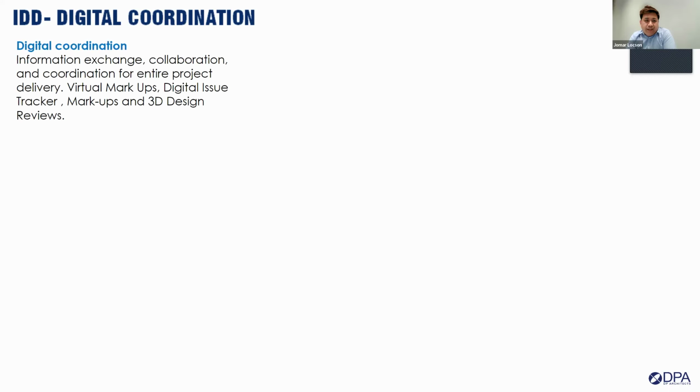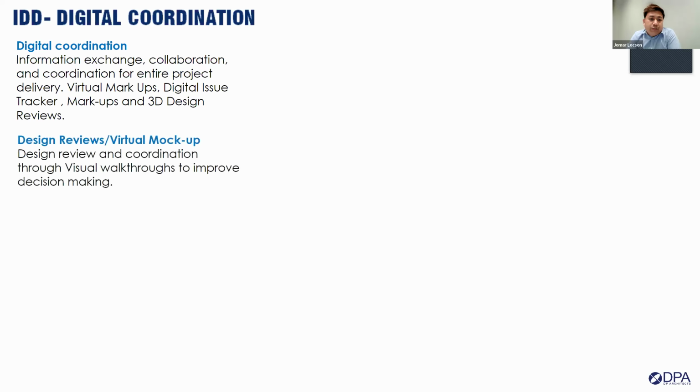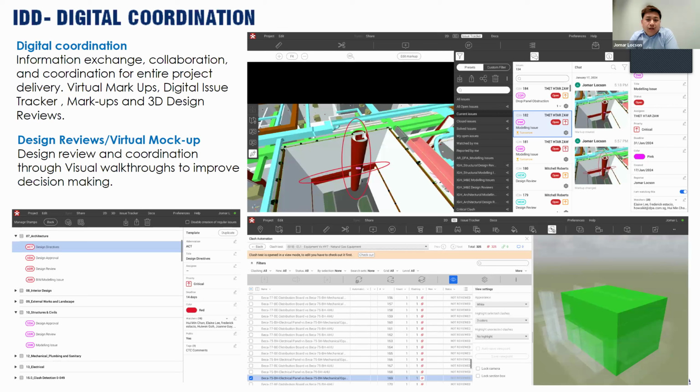IDD coordination. So this is the exchange of information, collaboration, and coordination for the entire project delivery. For the sample of design reviews and mock-ups that we're doing, we are using Issue Tracker in Revizto to generate stamps and filter out issues that are critical, non-critical, major, or minor that have been highlighted during the design review or ICE meetings. These stamps can be exported into reports that we are submitting to the client as a way for them to